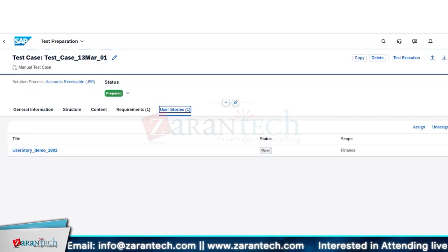So if there is any issue in the FUT phase, it's on our end, such as a transport not being done. We can change the status and do that correction in the test itself. As per my understanding and experience, that particular stage will not be called a defect. The reason I'm coming to this point, Ratan, is that if you identify a defect, a defect number will be created, and for that you also need to make some documentation.